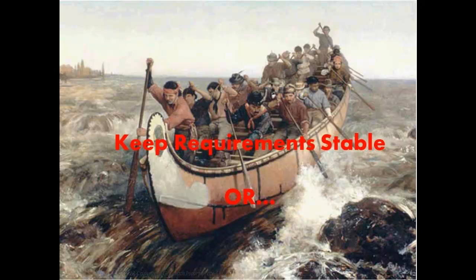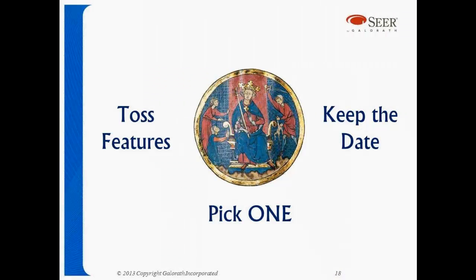We'd already mentioned that the requirements need to be kept stable on a stressed system like this, where you have a fixed date. If they're not, if the Supreme Court weighs in, if politics pulls states out of participation, you're going to get requirements volatility.